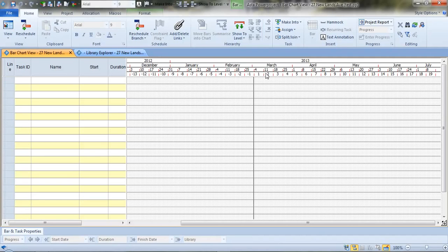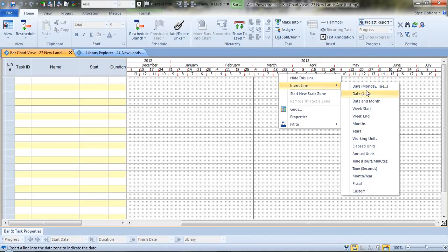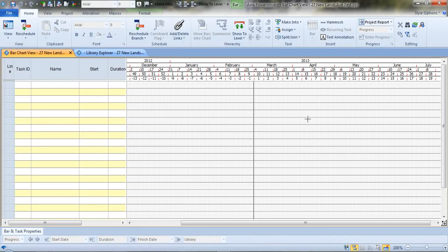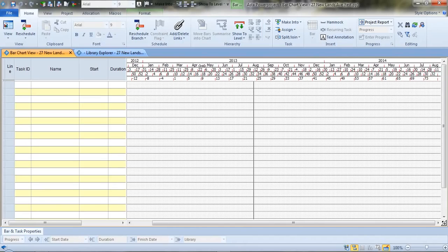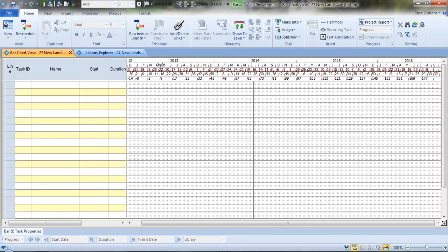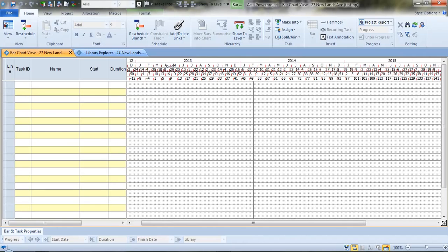At the top of the screen, the date zone, as it's known, is very important, and this one's got 4 different date rows, but we could have up to 10 different rows in this particular area. Here I could put another entry which shows us the week number that I would find in my diary. You change the scale in PowerProject by putting the mouse on a tick mark, holding it down and dragging with the mouse. You can scrunch the scale down so we can see a lot more information on screen, or we can zoom it out and see what's happening next week.